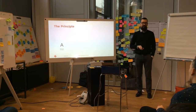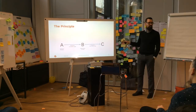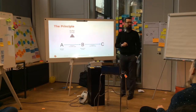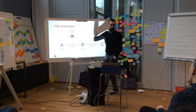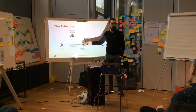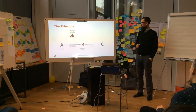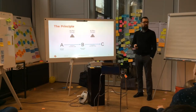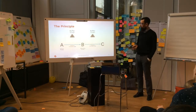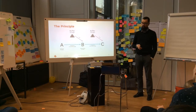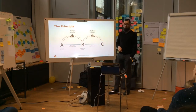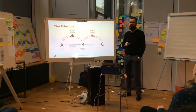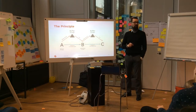Imagine you have a process with workflow steps A, B, and C - a production workflow that could also apply to any knowledge work. What they introduced is a buffer. Usually if you have someone producing, the production flow would go directly to B without any further information. The idea was to have a buffer storage area, such that B and C would not get material from the upstream process directly but would pull material from the buffer. So we put something in between. But what's missing? What do we need for that? It's not yet a pull system - what is the key element here?